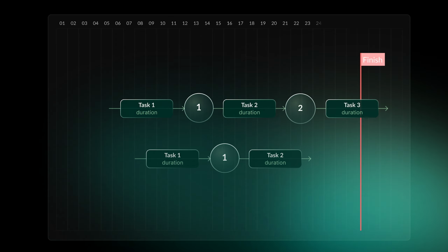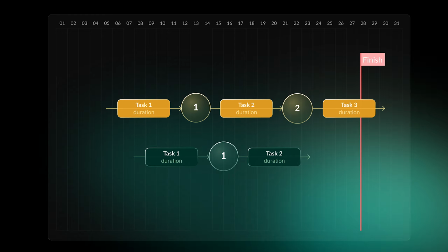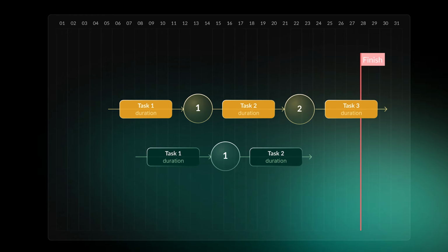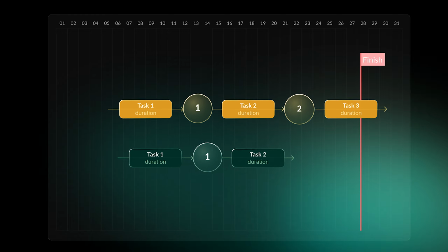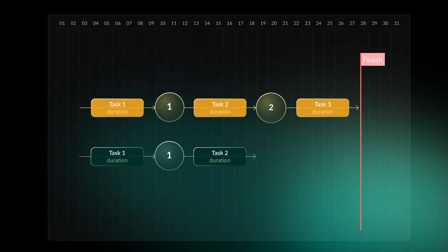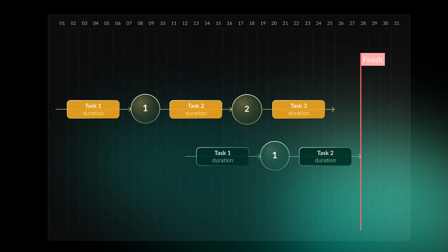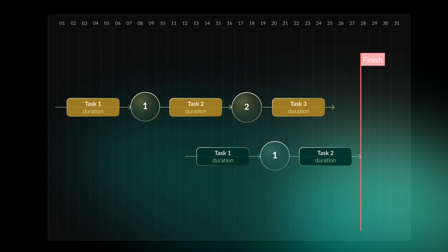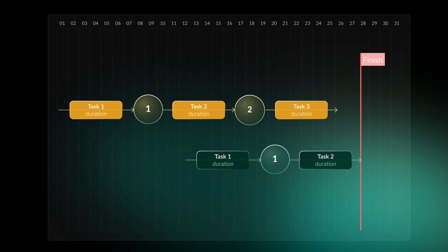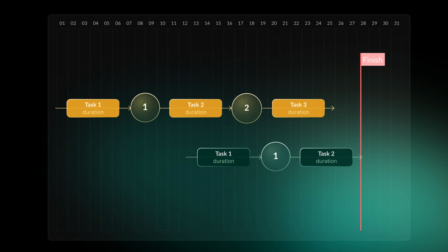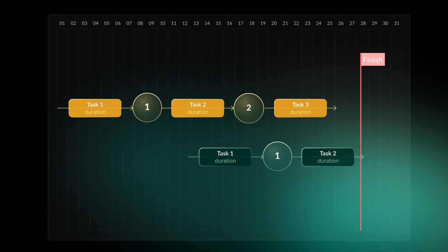A critical path is a handy instrument, but on a PERT chart, it has one significant limitation. It assumes all chains start simultaneously. If in reality the longest chain finishes earlier than others, PERT will still mark it as critical, even though it doesn't actually drive the project's end date. In such cases, you won't be able to see your real completion date.